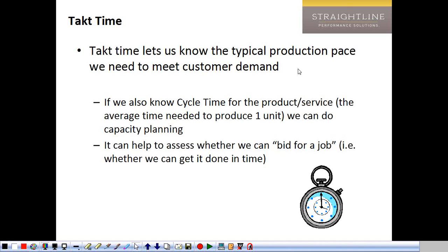If you're managing this, IT system design change process, for example, if we need to do 20 in a quarter, that means we need to do 20 divided by 3 per month, right? So that's what, 6.5 or 6 1/3, and that means that every week we're going to be doing essentially 1.5. So if a few weeks have gone by and we haven't had any releases, we know we're a bit in trouble.